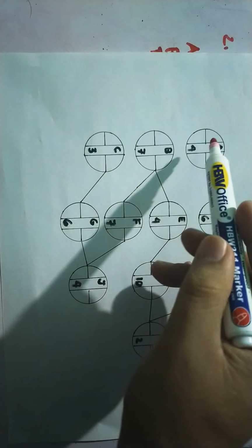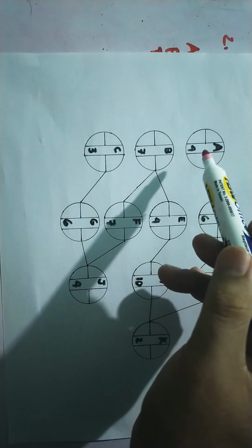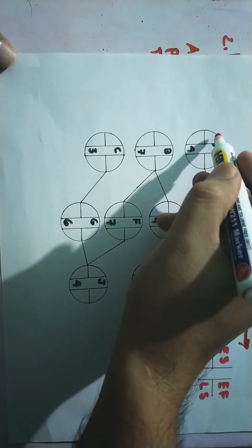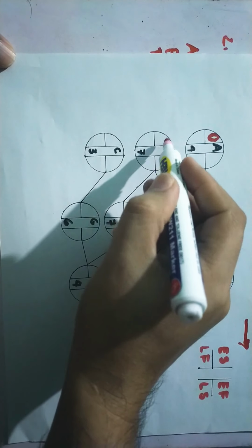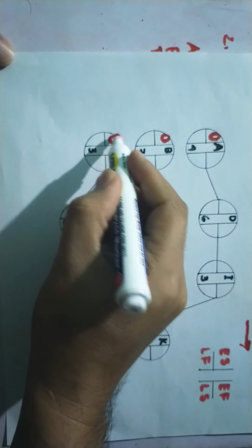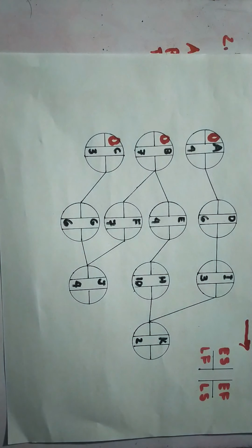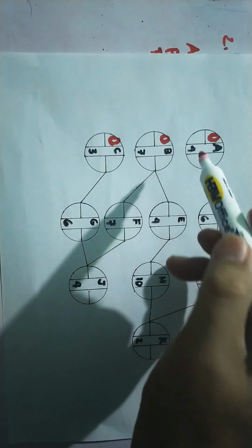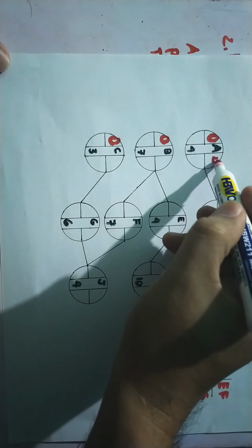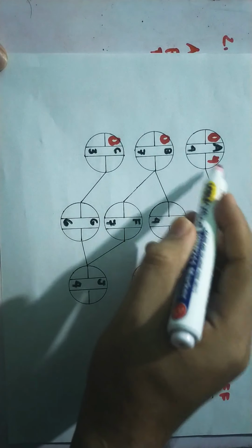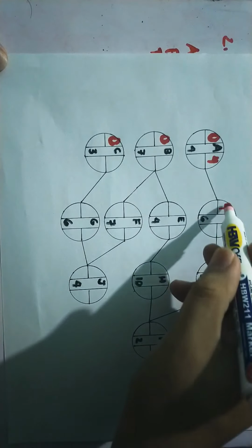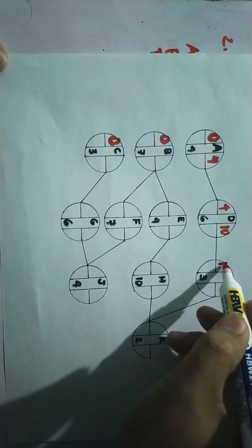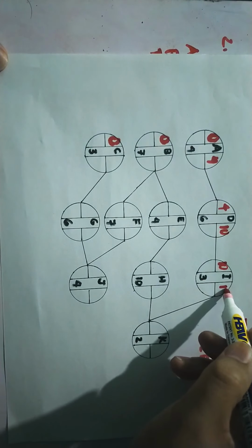Okay, letter A, of course, this is the activity. This is where activity A starts, so definitely it will have here 0, as well as B 0, and then C 0. Okay, now using forward pass, we will add this number to this one, so 0 plus 4, that is equivalent to 4. And then going to this one, copy this 4. Okay, 4 plus 6, that is 10. And then copy 10 to this one. 10 plus 3, that is 13.